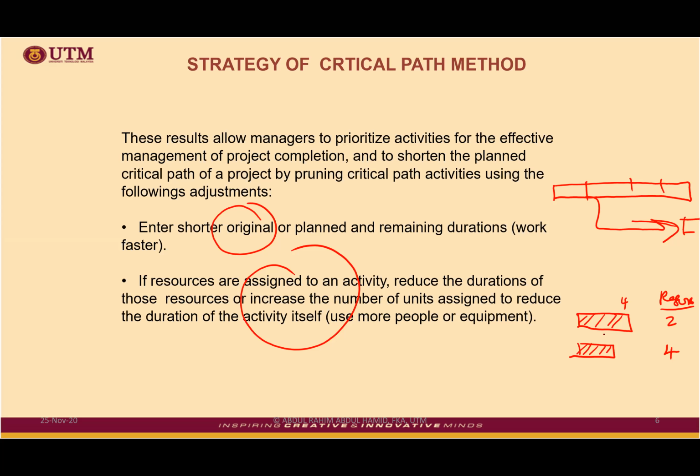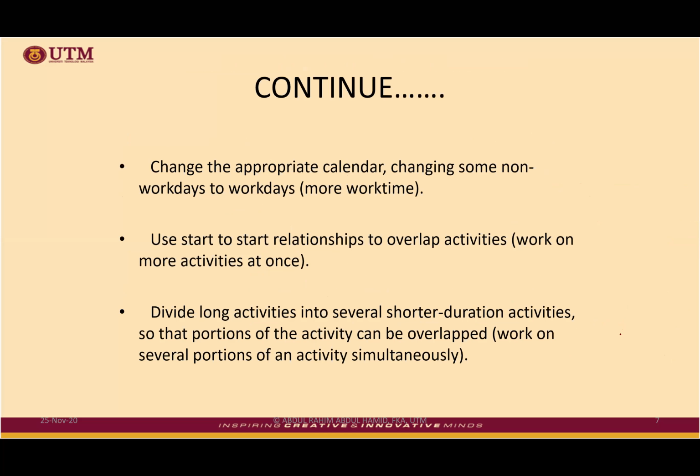in terms of completion. Let's say our project is supposed to be completed within 1 year, but then we have a COVID situation, which has eaten up a few months of unproductive time. So for the remaining time, we need to do almost everything in the remaining time. So we need to do this kind of strategy. Put more resources. Change appropriate calendar time.